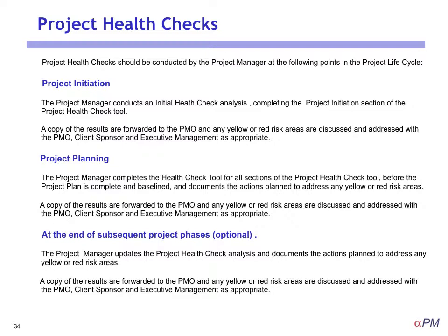And then you do it formally in the project planning phase before you baseline your project, because as you go through the process, as you go through the checklist, you'll start to realize that maybe there are some things you either forgot about or some things you need to tackle and do differently. So it will affect your project plan. So you should definitely do it before you baseline and complete your project plan.